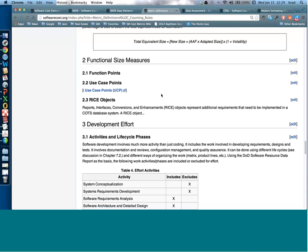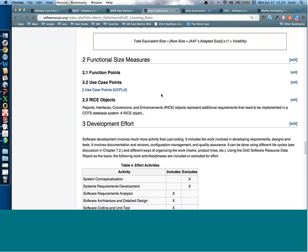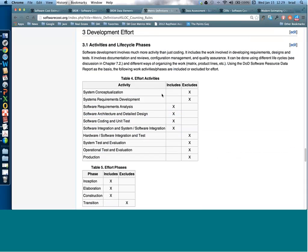Besides size, the other important variable for CER development is effort. The question is what's included and what's excluded in the development effort used to calibrate your model. In our analysis we included requirements analysis, architecture design, coding and testing, software integration, and system testing. We left out system requirements and system-level activities, focusing mainly on the software domain. To explain your CERs, you need a table showing which activities are covered, as well as which labor categories are included — just programmers and testers, or also project managers, QA people, CM folks, and librarians.